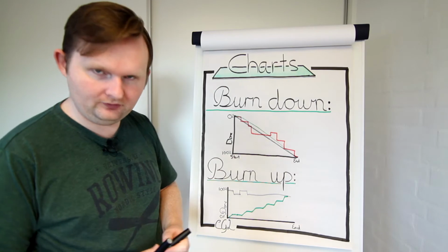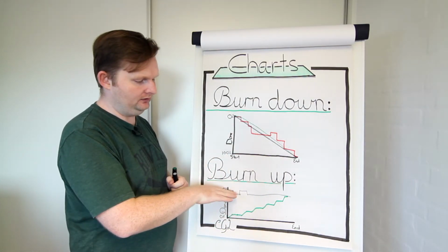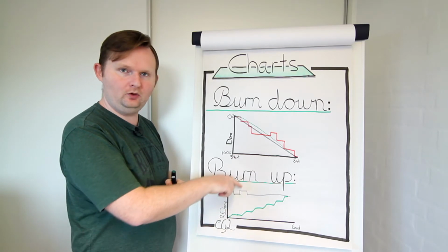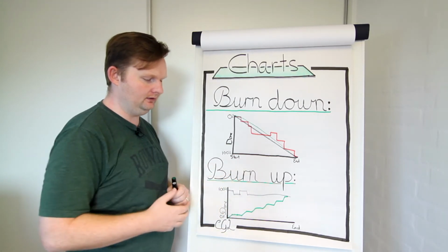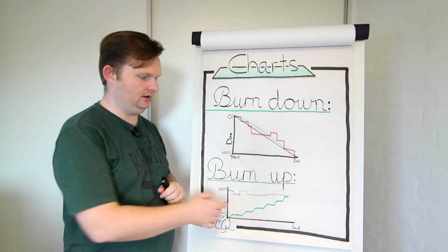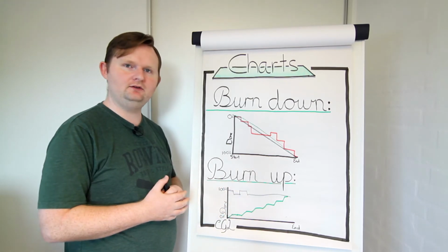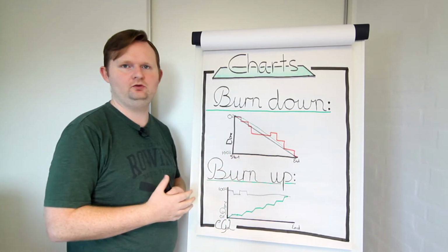And this also works for release planning, right? So on a longer horizon, we can see our release, did the release become smaller, bigger, or how is it actually doing? And that is why I like these burn up charts much more than just the burn down charts. I think we can convey much more information in these ones. And it's not as demotivating as seeing this one doing minus work.